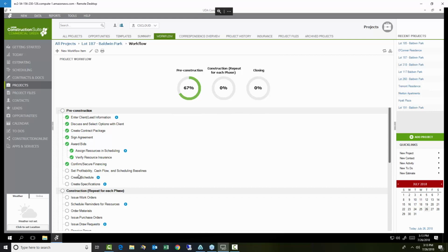The primary difference between your workflow and the schedule is the location you're doing the work. So the schedules, for example, that's going to be everything that happens on a job site. Or happens supporting the job site or hitting the job site. We're talking about going and doing the installations or the demo work, maybe scheduling material deliveries or inspections or walkthroughs with your customer for a punch list. All of that is going to be very schedule specific.